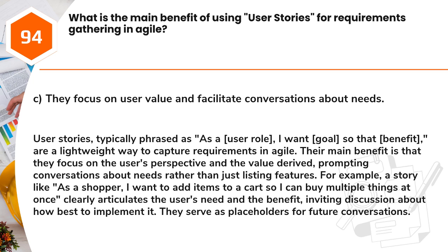For example, a story like, "As a shopper, I want to add items to a cart so I can buy multiple things at once," clearly articulates the user's need and the benefit, inviting discussion about how best to implement it. They serve as placeholders for future conversations.